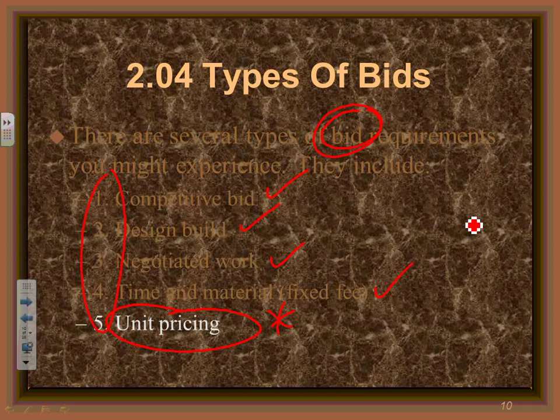Another place where the unit price applies, Karen, is when they change the service. So you have a 60 amp service, we want to change it to 100 amp service. Very simple for smaller contractors. You take a panel out, put a new panel in, and sometimes you have to put a cable. Very, very typical. Well, we can do it for $1,500. Done. How many of them you wanted me to change in South Minneapolis? Multiply them by $1,500. So you go to the city of Minneapolis and say, I can change all these for you in the whole neighborhood here, $1,500 a pop. That's called unit price. Any comments, guys, questions about unit price? How do you know it's going to cost you that much? Because you went through the estimate for it. You've done it a few times.